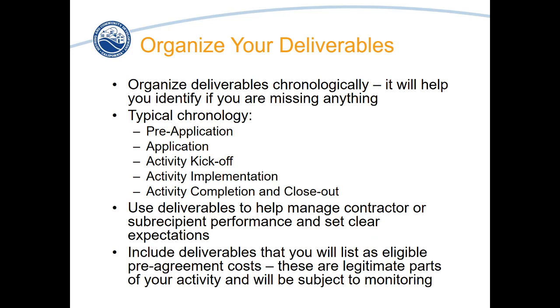You'd have your pre-application requirements. So what do you have to do pre-application to get yourself ready? You'd have your actual application itself. So what documents are you going to need to be able to upload in your application to submit successfully? You'd have your activity kickoff. So you've been awarded funding and now it's time to get your activity started. Is there ramp up? Are you funding an activity that's been ongoing? What are you going to need to do to get that funding into the activity budget or into the activity scope of work? You've got your actual activity implementation.